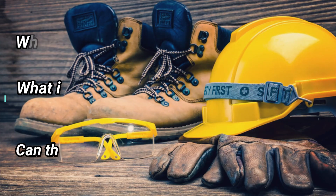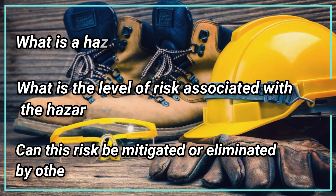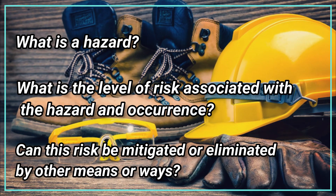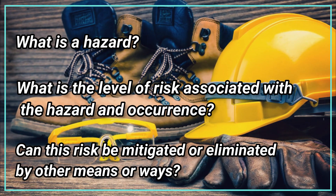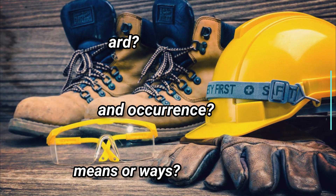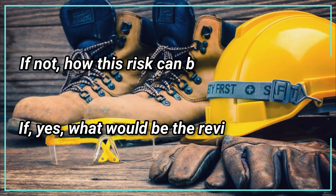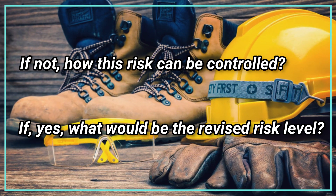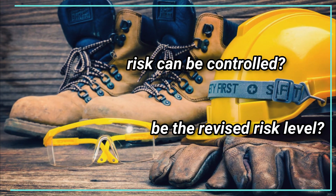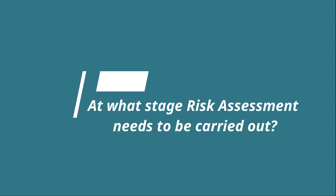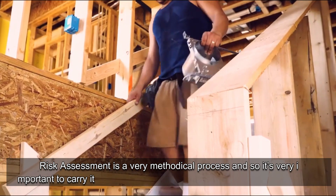Here are some key steps to determine the risk: What is a hazard? What is the level of risk associated with the hazard and its occurrence? Can this risk be mitigated or eliminated by other means or ways? If not, how can this risk be controlled? If yes, what would be the revised risk level?